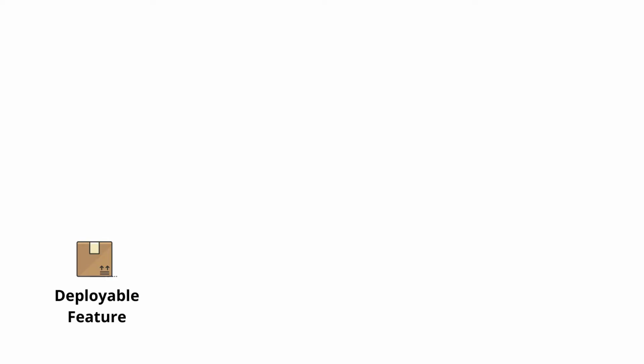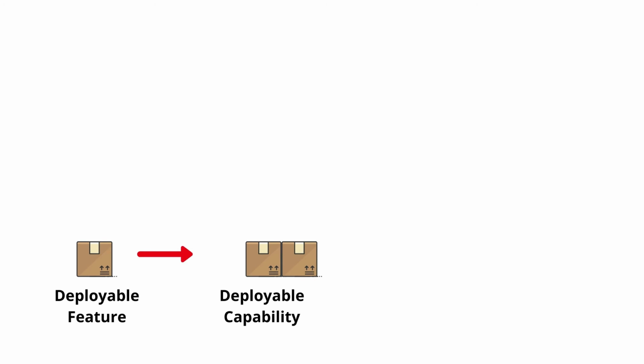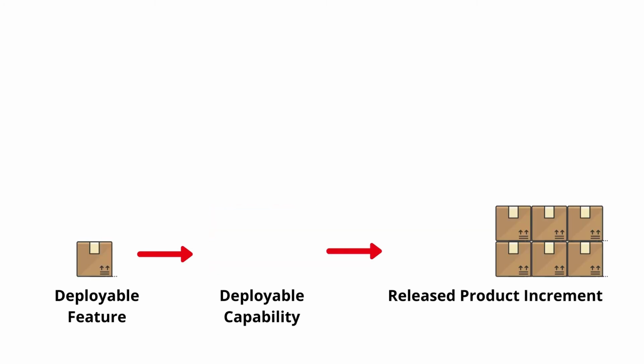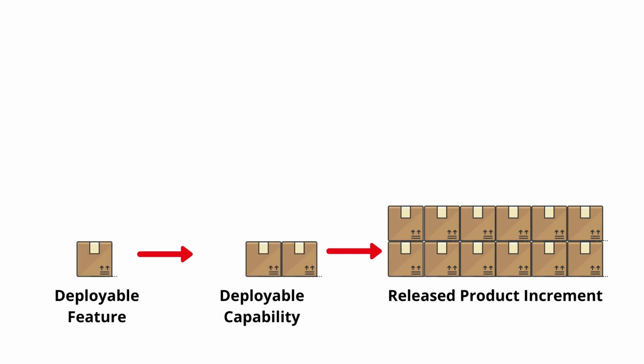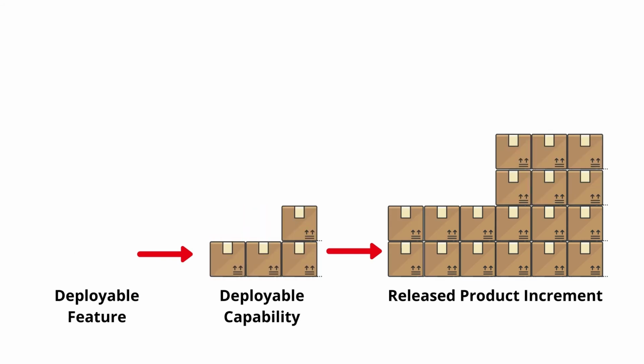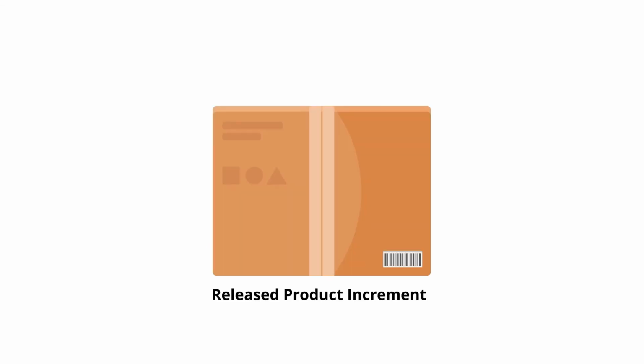Forming teams around system features is a staple of Agile software development. While component teams are sometimes necessary in Agile software development efforts, the default bias is towards forming feature teams. Under feature teams, system components form and evolve incrementally and iteratively, one feature at a time. Value delivery no longer depends on delivering the entire system. Instead, value delivery occurs one release at a time throughout development.